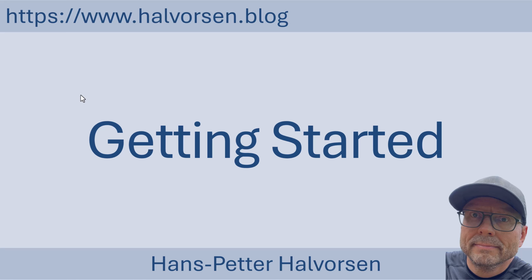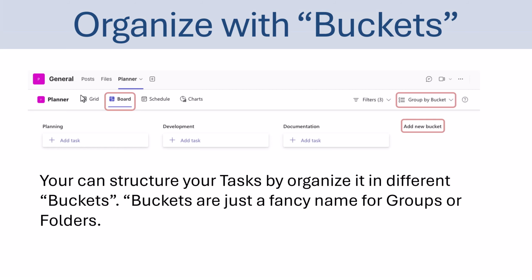So then next, let's dig into the details of how we are going to use Microsoft Planner in a specific project. Typically, the first thing you need to do is to set up some folders or buckets, as they call it in Microsoft Planner. So basically, buckets are just a way to group your tasks into different folders, or buckets, as they call it in Microsoft Teams and in Microsoft Planner.